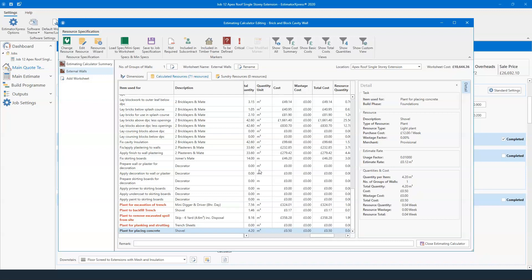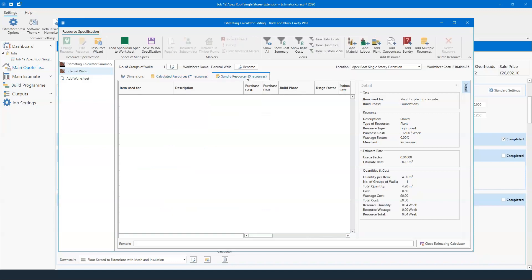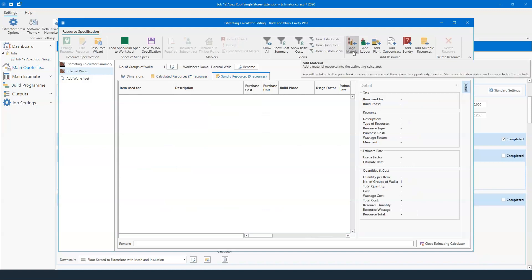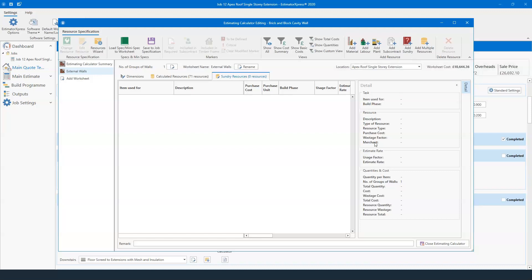On this page you also have the opportunity to add extra bits and pieces to the brickwork shell. I don't mean sandstone lintels — those come later with windows and doors. I mean if you have a particular feature or method that requires extra materials or labor. When on this page, next to Calculated Resources you have Sundry Resources — click that and in the top right-hand corner you can add any additional material, labor, plant, subcontractors, or sundry items as needed.